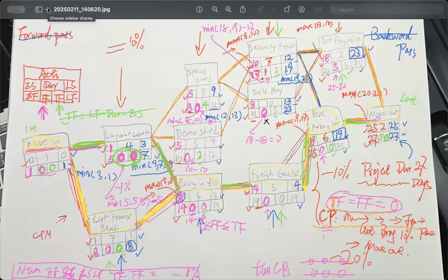Yes, sir. Okay, good. So the critical path means all the activities in that path are critical activities. A critical activity is one where the total float is equal to its free float is equal to 0. So those are the critical activities and the critical path. If you have more than 1, yes, that can happen. If you have more than 2, yes, that can happen. If you have more than 3, that also may happen, right? So you need to make sure you're catching all of them. Okay, so that is about the critical path. You may have multiple options here, and how to determine that.